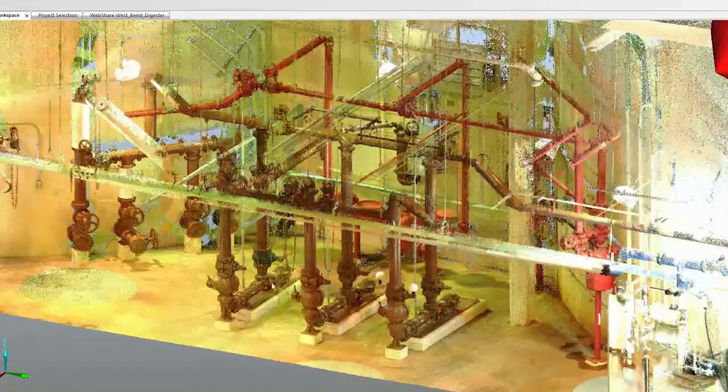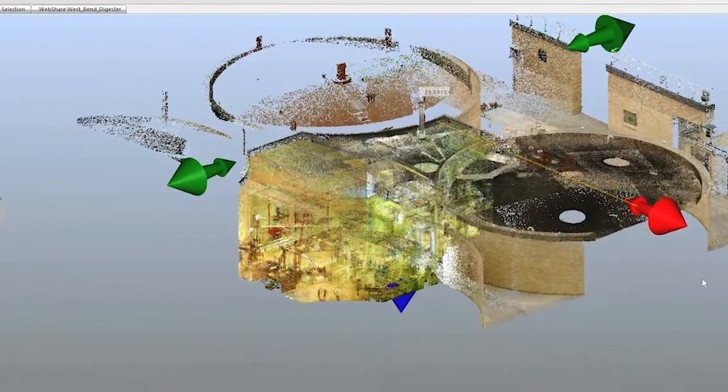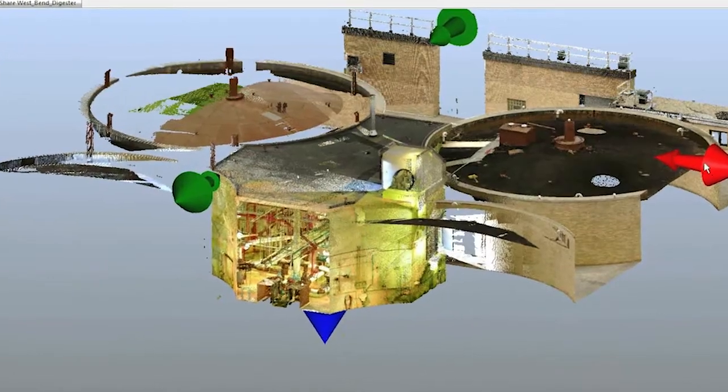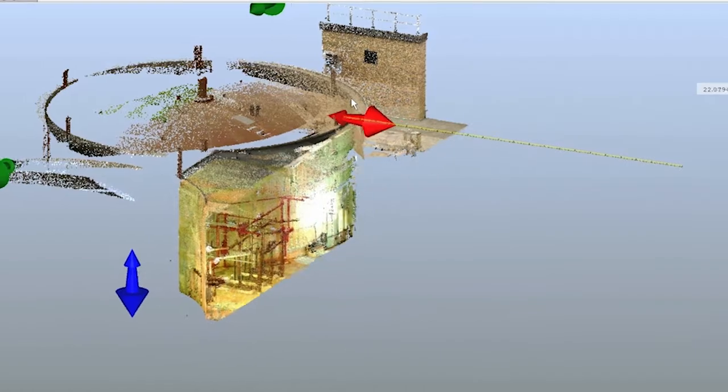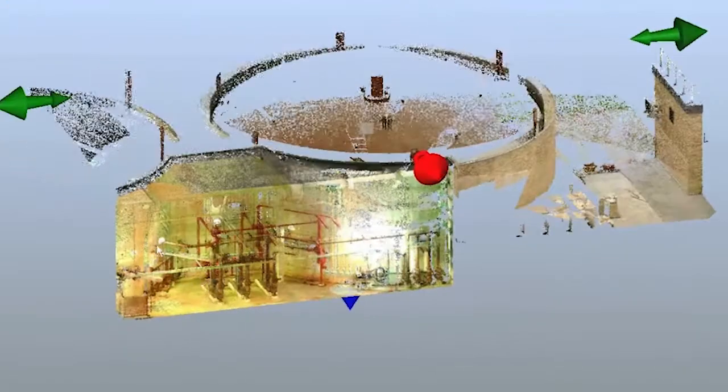This 3D information can be imported as point cloud data into CAD software and transformed into 2D drawings or a 3D building information model that becomes the background for your engineering and construction documents. There is no need for the design team to spend time measuring up the space. Conflicts can be identified. Planning for shutdown work has a comprehensive as-built to work from.